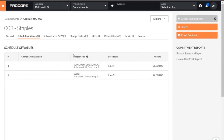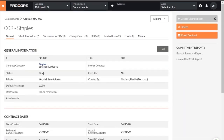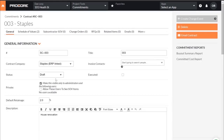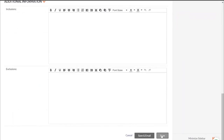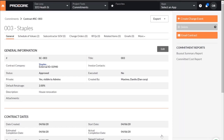The synchronization rules are very straightforward: you must have at least one line on the schedule of values in the detail section — which we're good with here — and on the general tab the status must be Approved. This is the dual workflow I mentioned earlier. Within Procore you can get all the information correct, then go into edit mode, change the status from Draft to Approved, and press Save. Now that those two conditions are satisfied — status is Approved and there are two schedule of values lines — that information will start to flow from Procore over to CMIC.